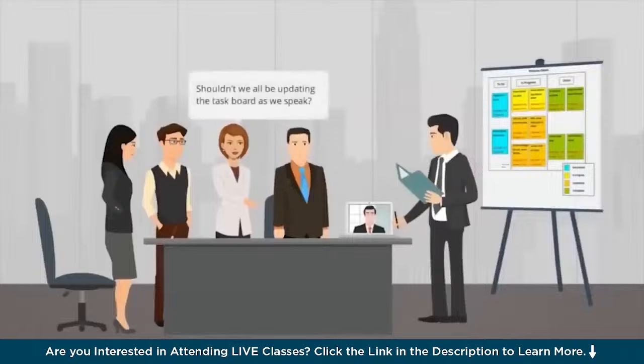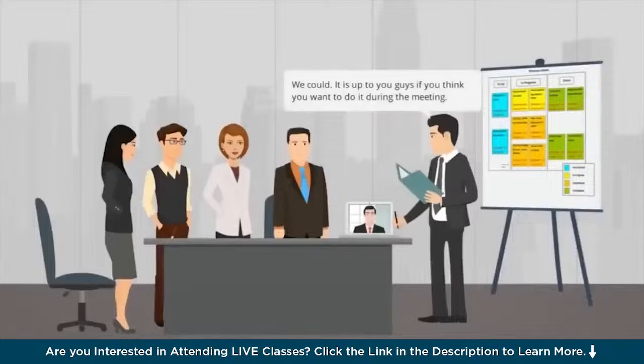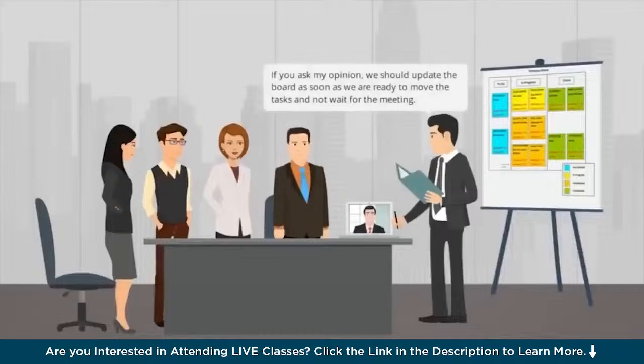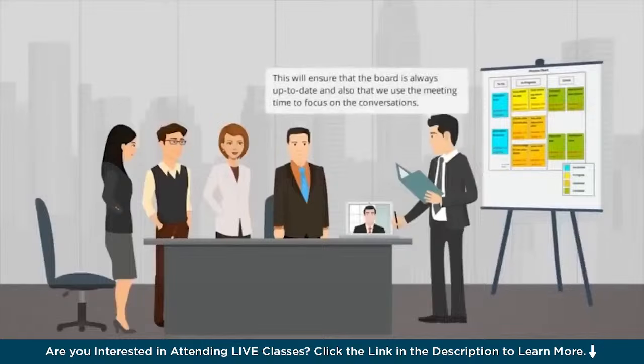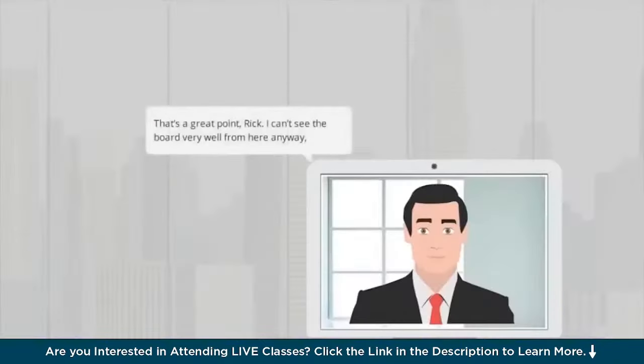Shouldn't we all be updating the task board as we speak? We could. It is up to you guys if you think you want to do this during the meeting. If you ask my opinion, we should update the board as soon as we are ready to move the tasks and not wait for the meeting. This will ensure that the board is always up to date and also that we use the meeting time to focus on the conversations. That's a great point, Rick.